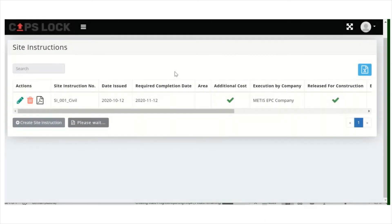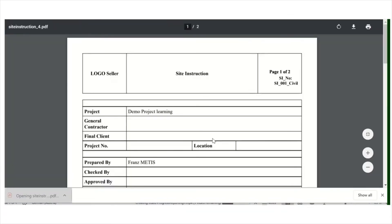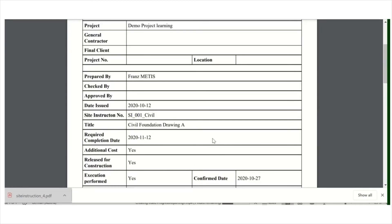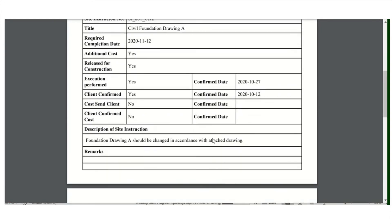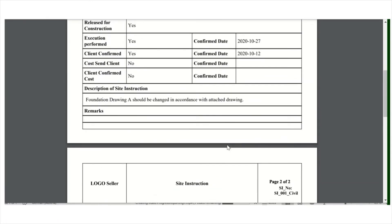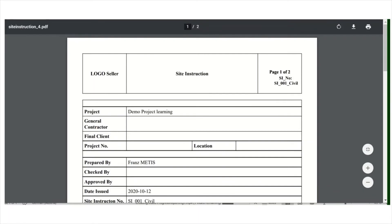You get a PDF of the site instruction. In this PDF it shows all the information which has been filled out. You get a signature field, and also the client or others can sign. Then you have a full traceability of your site instruction — who performed it and when.